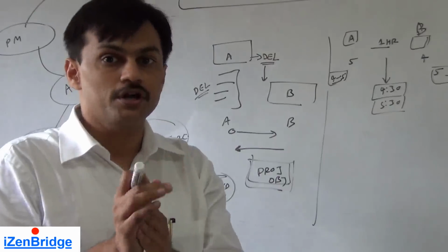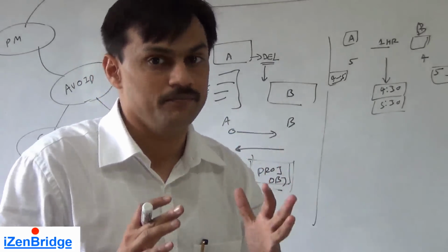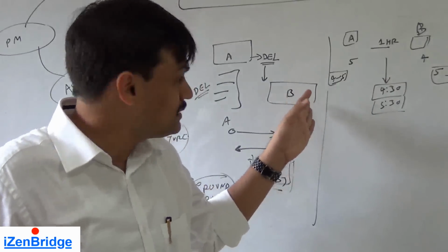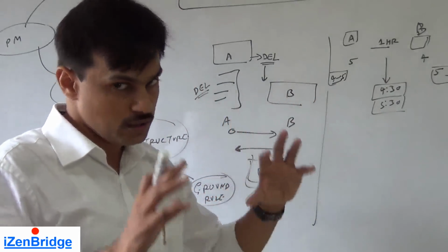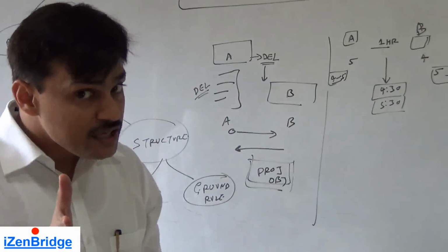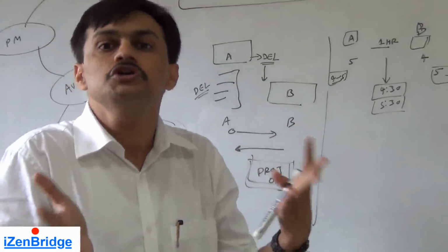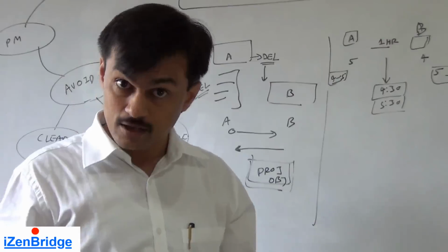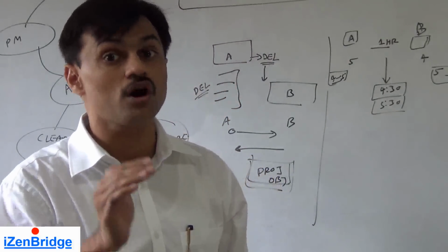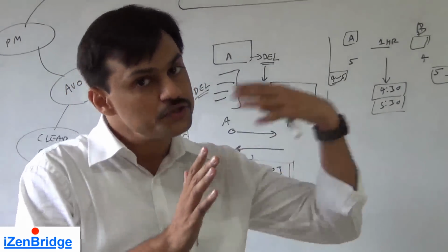In that duration, you may want to collect the information, or you may want to give time to the situation where team B may automatically realize that the demand they were making was not justifiable. It was too unrealistic. So sometimes we think withdrawal is always negative. Yes, usually doing nothing is not good. But in some cases, when somebody is trying to force their things on you and you are not in a situation to counter it or compromise, you may apply a withdrawal for a duration.